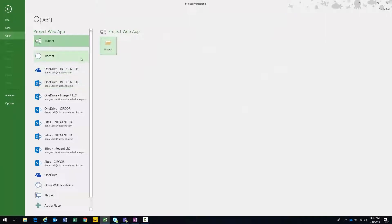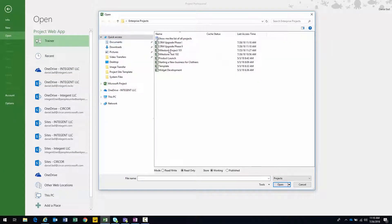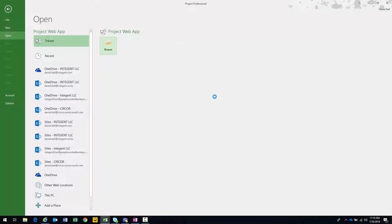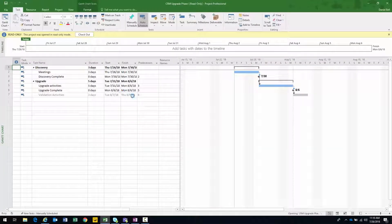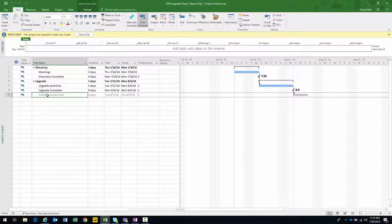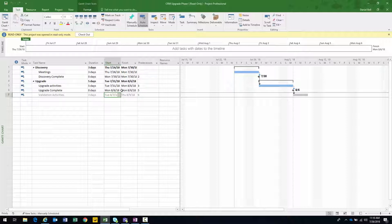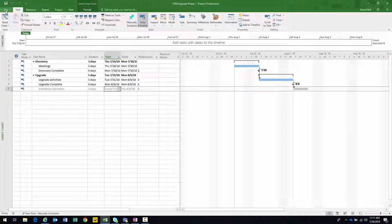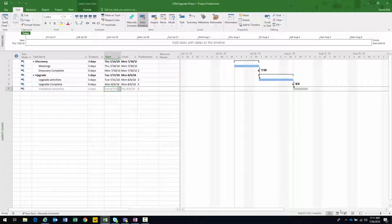So now I'm going to open upgrade phase one. There's my project. Notice that there's the successor — it comes up a little grayed out. It shows it's starting on 8/7, which is when the predecessor finishes — 8/6 — and then it starts the very next day. It's also represented within the Gantt chart. I'm going to go ahead and publish this. We can see that it's saving and publishing in the bottom right.